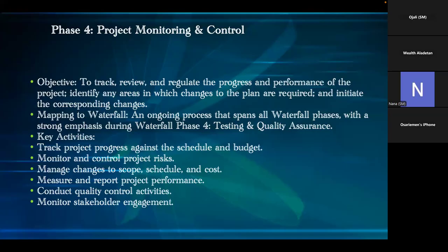So this discussion you're going to have with whoever is handling that particular task as part of your team members. If you are talking of the coding team, you discuss with the developers. If it's the unit test that you want to confirm, you discuss with the testers and say, oh, testers, how long is it going to take you to do the unit test for the whole system, for this part of the system? And then based on their experience, they will let you know. So this you put into your schedule.